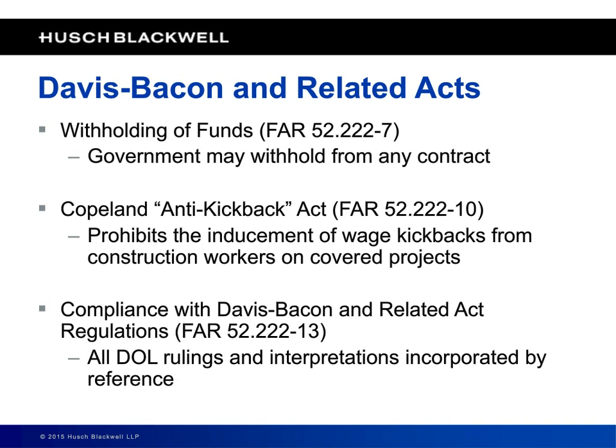And then finally, the compliance with Davis-Bacon Act and related regulations clause. That clause, all that requires is that all DOL rulings and interpretations of Davis-Bacon and related acts found in 29 CFR Parts 1 through 5 are incorporated by reference into your contract, and you are subject to them. So you need to know what's in there. And those are going to have things like how you compute overtime and what's working versus an authorized rest and all those sorts of things.